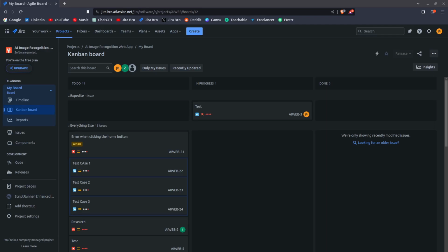All right, so you can define an epic as something on the top of the hierarchy when it comes to the issue types. Why? Because in epics, you're grouping all of the smaller chunks of work. What do I mean by this? The smaller chunks of work are the following: you have stories, tasks, and subtasks.